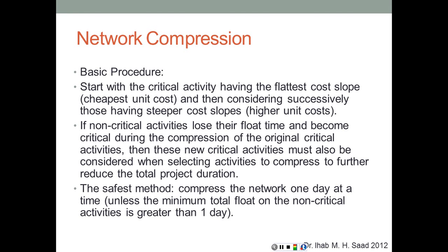Non-critical activities may lose their float time and become critical, because once we start compressing, the non-critical activities are going to lose some of their float. So what if an activity had only 1 day of float before compression? After compression it became critical. Now we have created a new critical path, or new critical activities that have to become candidates, and the same rules have to apply to these activities in selecting them for compression.